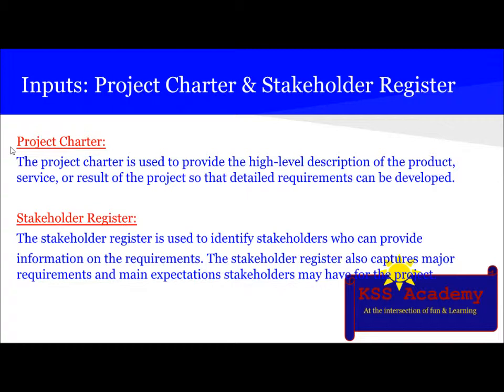In brief, the project charter is used to provide a high-level description of the product, service, or result of the project so that detailed requirements can be developed. Stakeholder register is used to identify stakeholders who can provide information on the requirements. Stakeholder register also captures major requirements and main expectations stakeholders may have for the project.